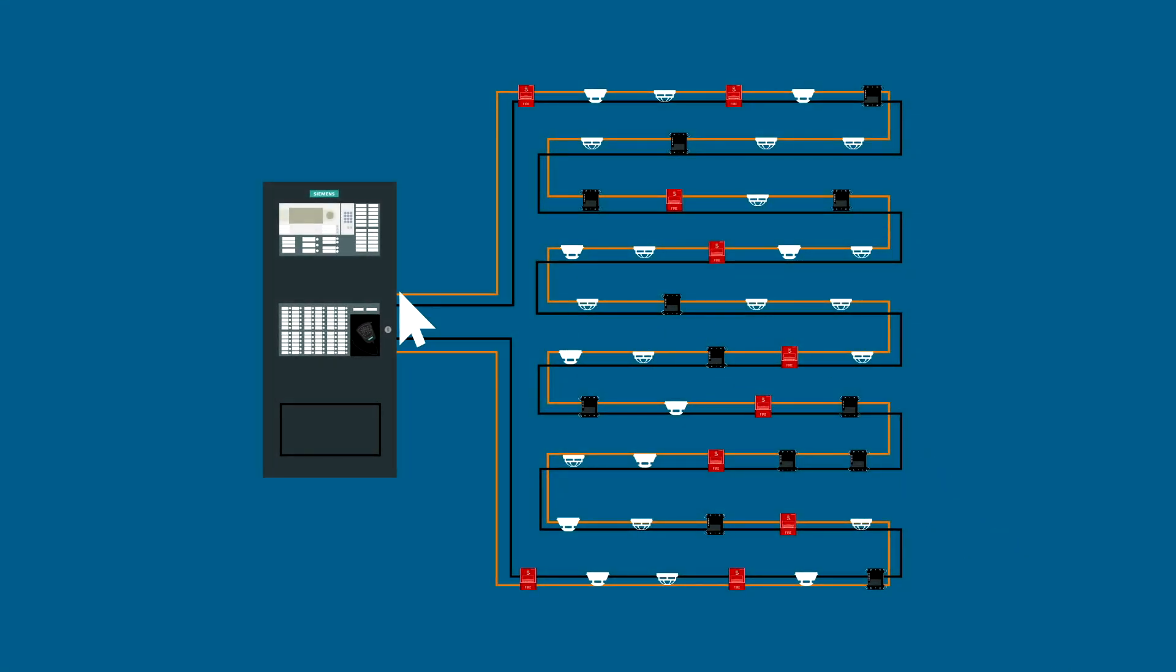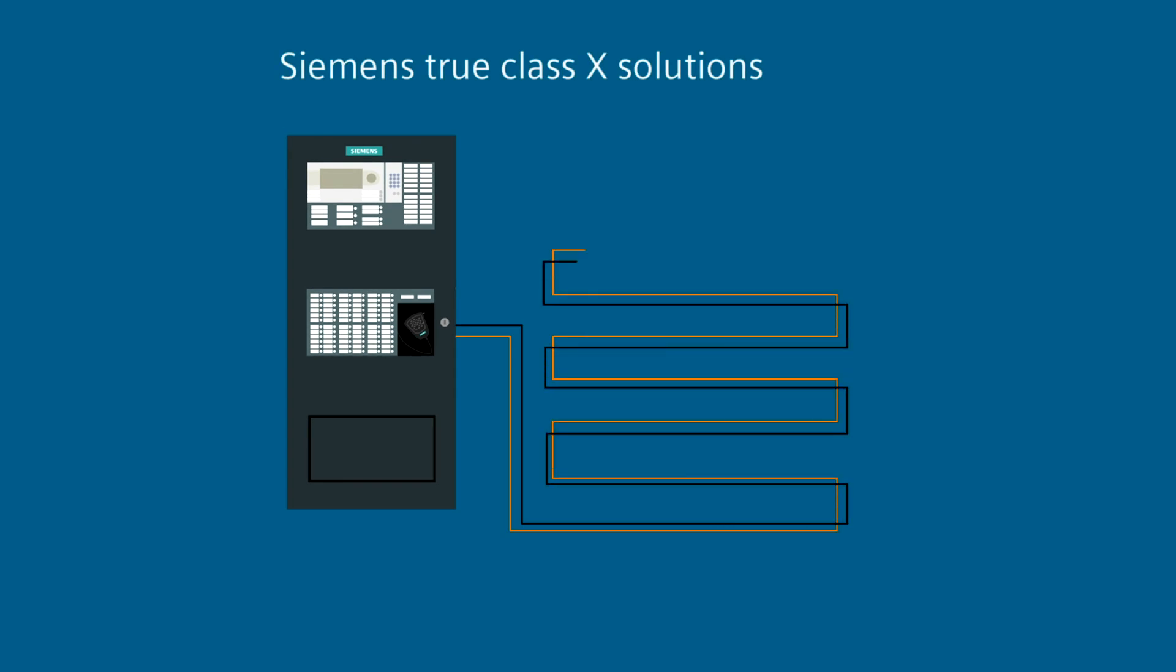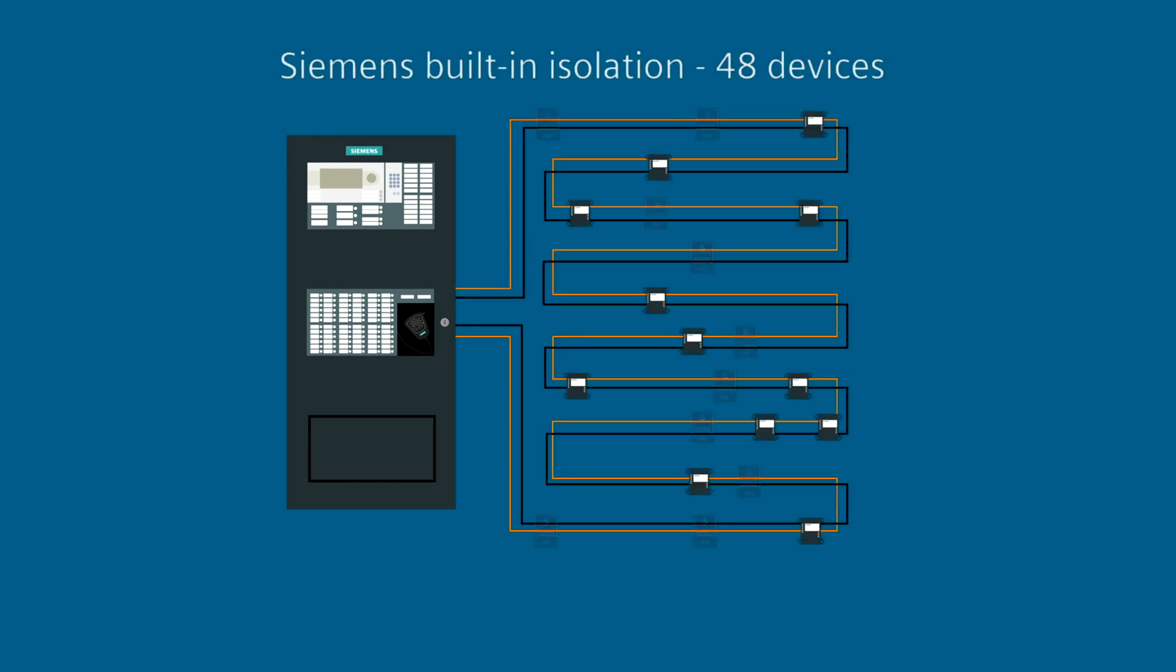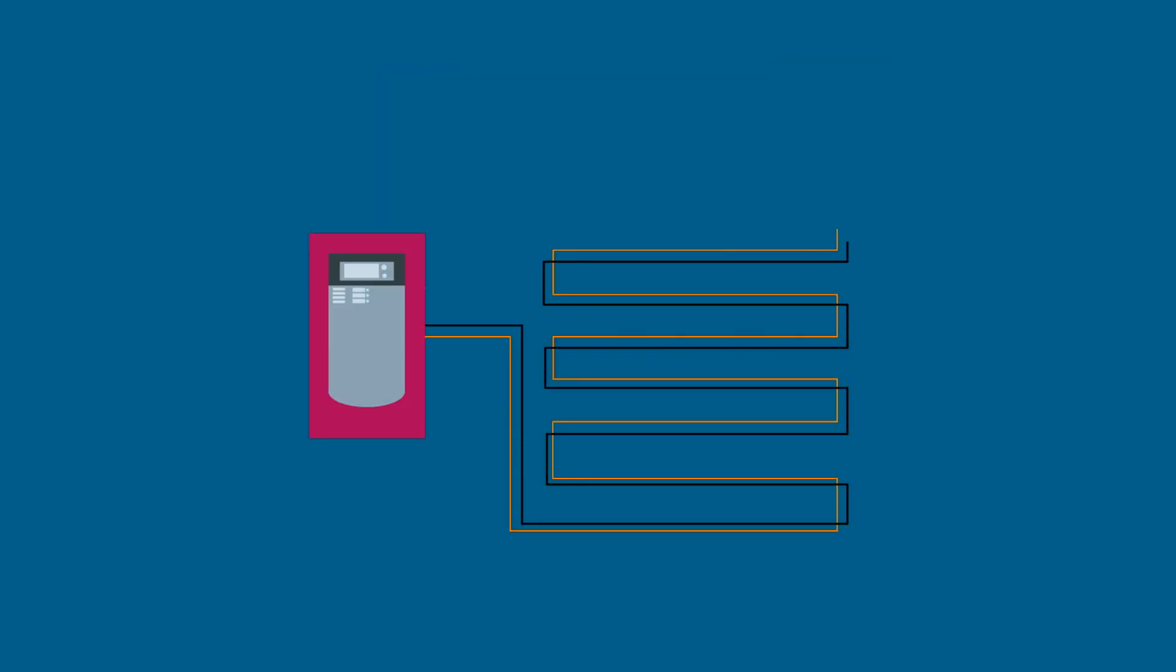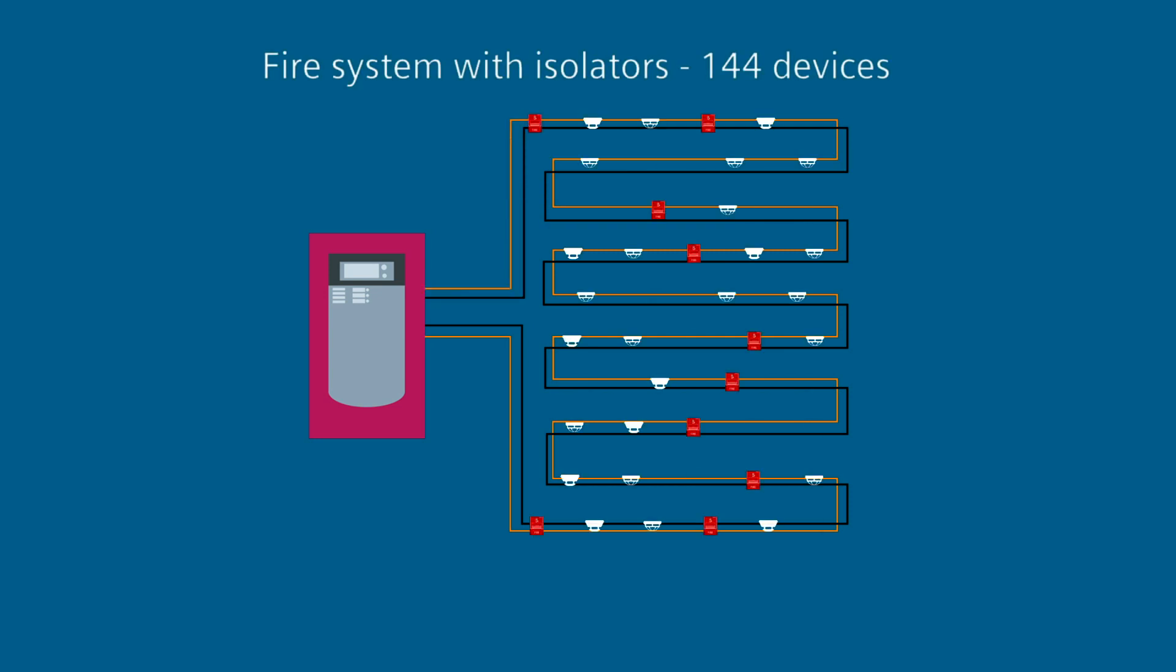Here's an example. In this scenario, a fire system with Siemens built-in ISO technology needs no additional isolation modules, while the other system uses 96 isolator modules at a cost of more than $8,000.